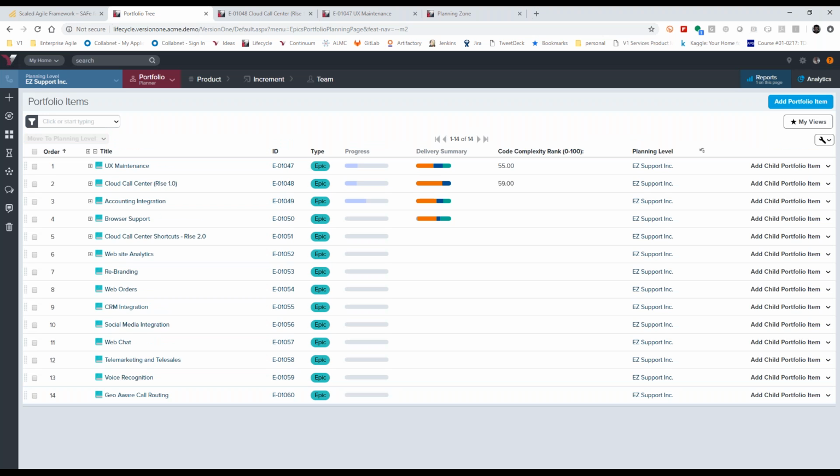So for the portfolio, what's going to be important, in addition to creating a vision and coordination for the rest of the organization to align to that vision, is to track and understand the feedback. So one of the feedbacks that a lot of organizations have gotten really good at is to understand progress. Progress is defined by the completion of user stories by teams. So as we complete work, we understand progress in that sense.